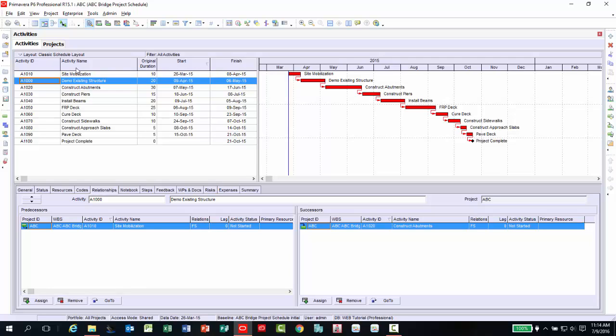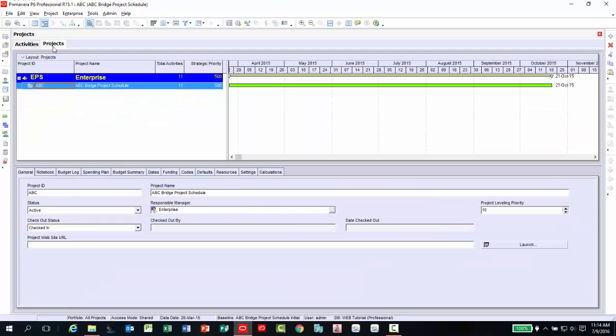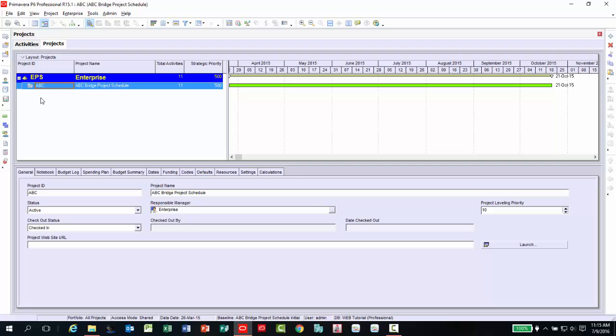If you return to the project tab, you will notice the file we created for the baseline is no longer available to view. That is why it is recommended you make a copy of the file before maintaining as a baseline. If you mistakenly maintain a file before copying it, you can always go back to Maintain Baselines under the project menu to restore the file.